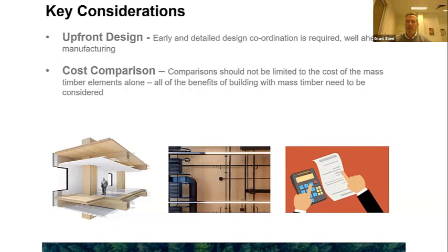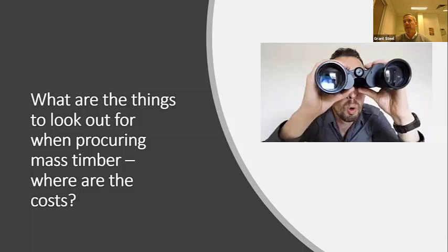I think you need to acknowledge the overall benefits that you are delivered out of building with mass timber. I think I'll touch on these now, but Richard will touch on them later. Typically, these are found in quicker programs. You'll get lighter foundations, reduced site prelims, mitigated secondary structures. It's safer, it's quieter, etc.